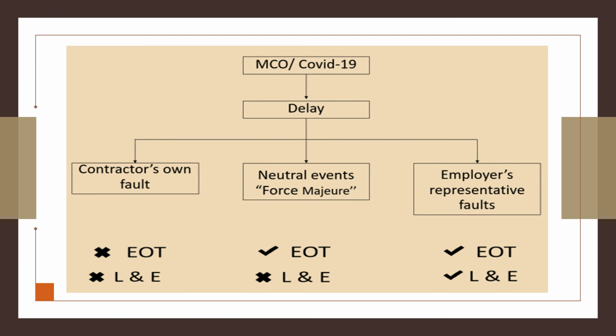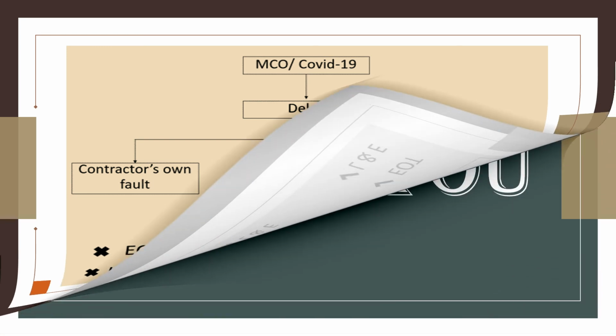However, if the delay is caused by the employer or the employer's representative, then the contractor shall be able to claim for extension of time as well as the loss and expense incurred by the contractor. Therefore, in this case, the contractor shall only be given extension of time and is not able to claim for the loss of expenses due to this pandemic.